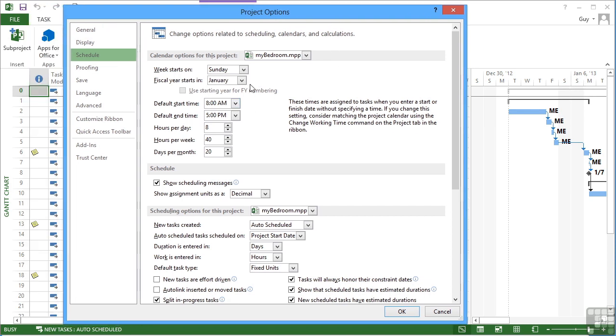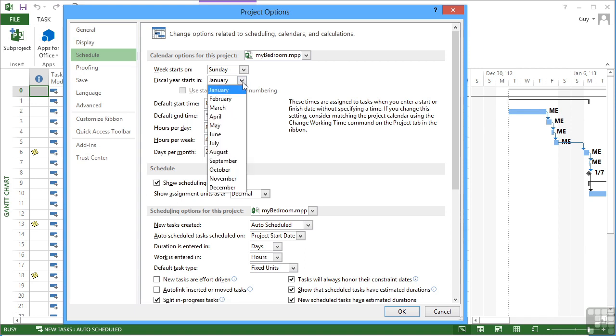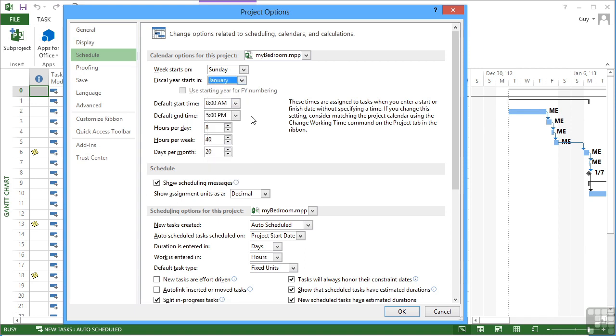The fiscal year starts in January, again we can control that. The day starts at 8am and finishes at 5pm. Now the thing that you don't control in here, and we will control in the calendar, is the lunch break for an hour. So although the day starts at 8 and finishes at 5, there is an hour of non-working time within the middle of that day.